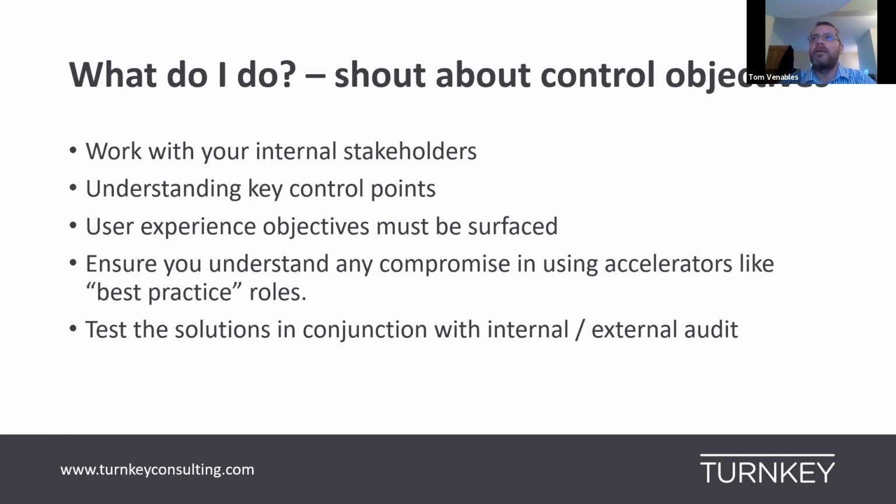You have to understand your key control points. You've got to understand that the user experience objectives have to be surfaced in designs. So if you only want to present the apps that a user should be accessing, you're going to have to design the roles in a way that only presents those apps. So that's going to limit you from using some of these SAP standard content catalogs and groups. Make sure you understand the compromises in using accelerators.